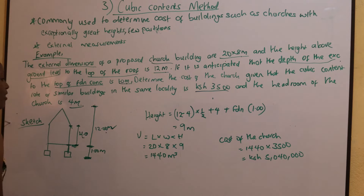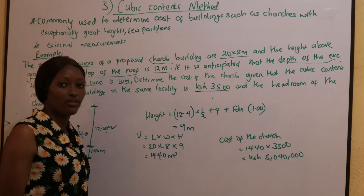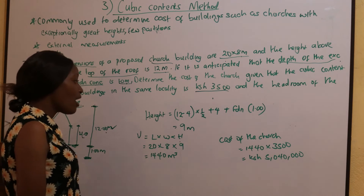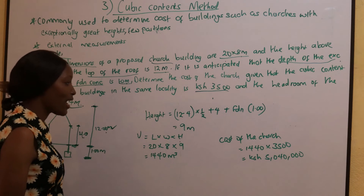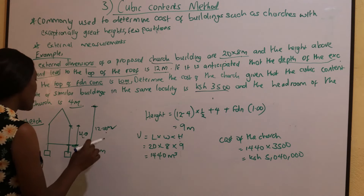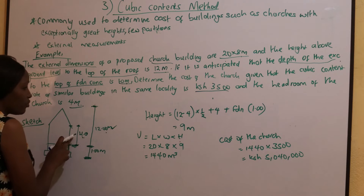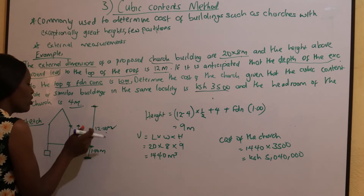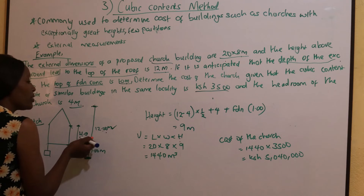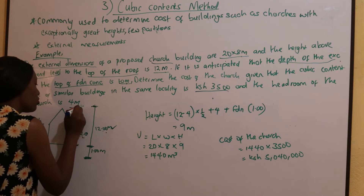How do we calculate the volume of this house? The volume is length times width times height. We have the length and the width, but we need to determine the height. The height is calculated by taking 12 meters from ground floor to top of roof, then deducting the headroom, and multiplying by a half to get half the roof height. So 12 minus 4 gives us 8. That 8 is from the top of the roof down to where the roof starts. For the roof, we take half of 8, which is 4. Then we add the headroom of 4, and the foundation depth of 1, giving us 9 meters.